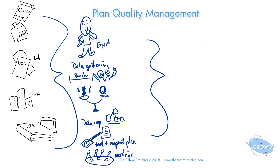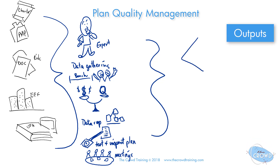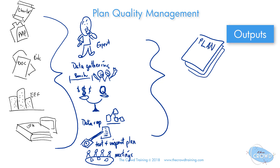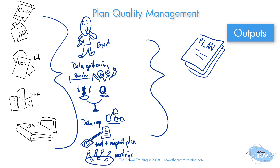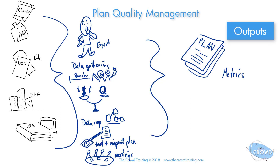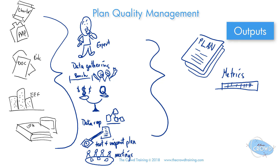Those are the tools and techniques. Let's move on to the outputs. Obviously, if we're all about making plans for how to manage the quality of the project, we should have a quality management plan. This plan will contain guidelines, tools, methodologies, and approaches for quality. It could also reflect the metrics that have been determined for measuring quality — when and how we're going to do it and what we're looking for.